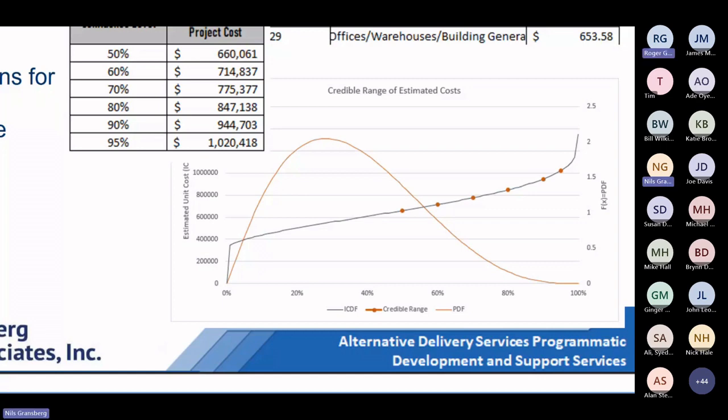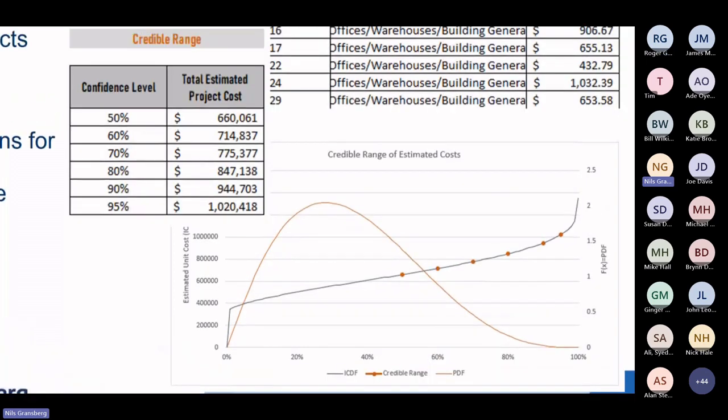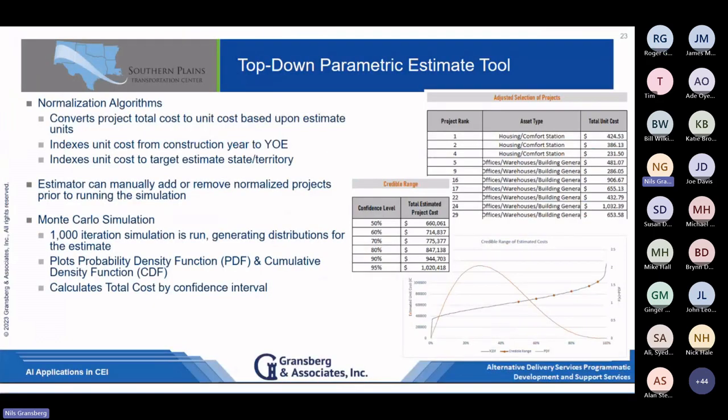If I'm above 0.5 to 1, or from -0.5 to -1, it's a little skewed. Maybe I've got a little lower confidence, which means I'm probably going to choose a higher number over here, right? A higher confidence level for my estimate, if I have less confidence in that being predictive. So it's pretty quick. It's actually pretty good deal.